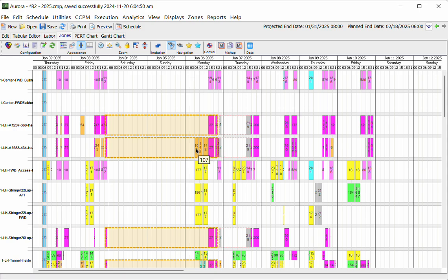So that is a characteristic of zones or some other resources. It basically is a question of whether a resource should be held and locked down when work is not going on, or whether it gets freed and other things can sneak in and occur in between. So in this case, we have allowed other work to sneak in between, because when work is not active, that zone is not in use.